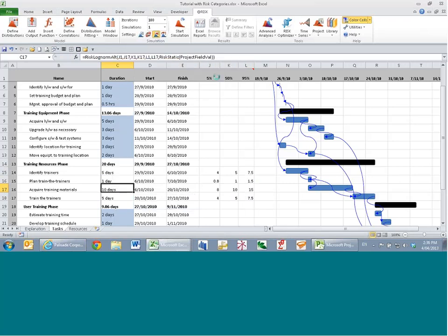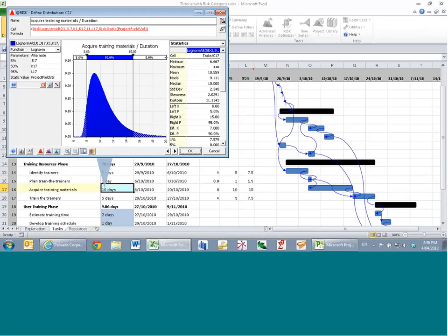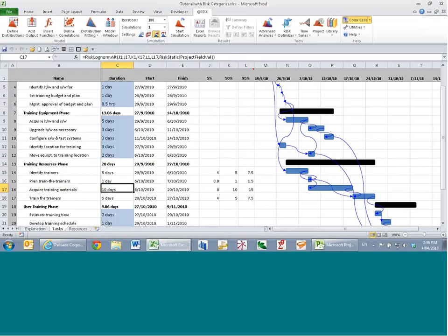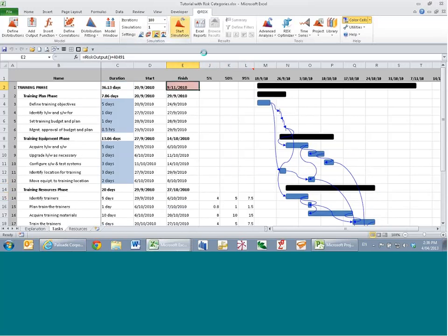Let's have a look at what I've created. There is my log normal, built using 3-point estimates put on the spreadsheet, again, potentially by an estimator or someone who doesn't actually need to know exactly how to utilize that risk. But now we can. We've quickly created log norm alt functions. There were only 4 here, but it could have been 40 or 400. We put in the parameters, our estimates for these, be they all selected individually or arbitrarily created using rules that make sense. And then, as always, run our simulation and get our results.